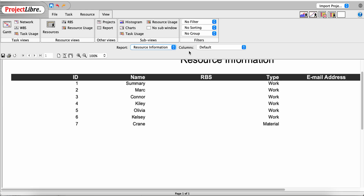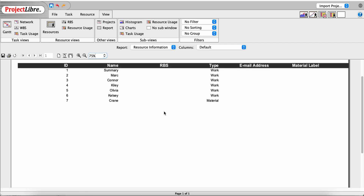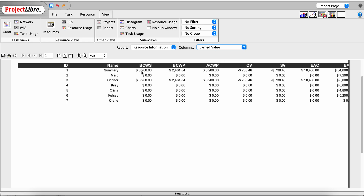The next report is Resource Information. The default version shows resource ID, resource name, resource breakdown structure, work type or resource type, email address, and material label. All resources here are work type until we reach Crane, which is a material resource. We can also change the columns — the same report becomes multiple. Choosing Earned Value shows Budgeted Cost of Work Scheduled, Budgeted Cost of Work Performed, Actual Cost of Work Performed, Cost Variance, Schedule Variance, Estimate at Complete, and Budget at Complete.